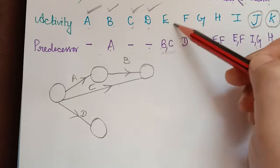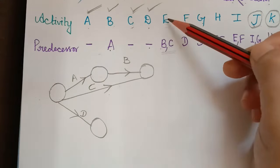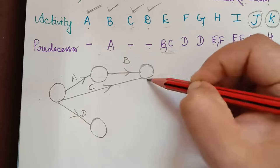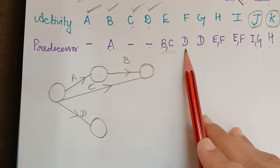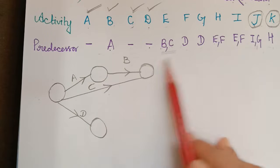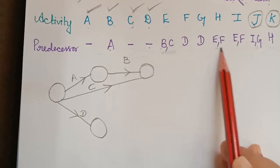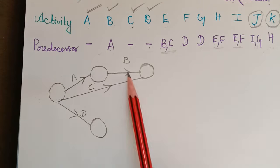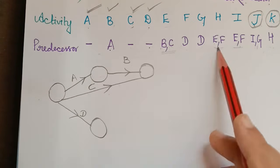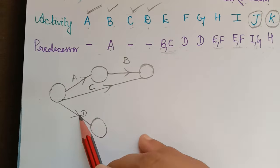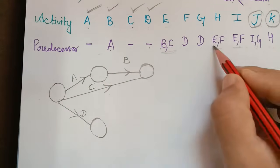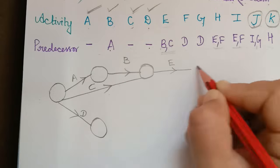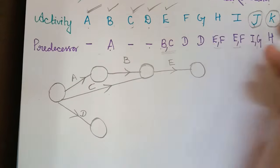Next is activity E, which has two predecessors: B and C. So the starting node for E is the end node of B and C. We check if E appears with any other completed activity — it appears with F, but F has not been constructed yet, so we draw E directly.